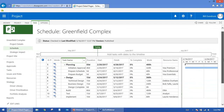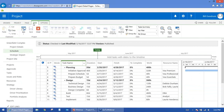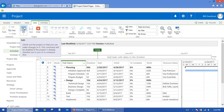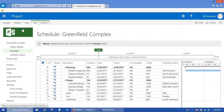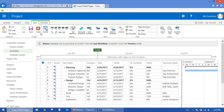A recently improved capability is that you can now do editing of your project schedules directly in Project Online. You can open the same project in Microsoft Project on the desktop, but you can also do a lot of basic editing right in the web app — updating percent completes, indenting and outdenting, linking tasks together, and assigning resources to tasks. If you're doing heavy-duty scheduling, you'll still want to use Project on the desktop, but for simple changes or small projects, the web app works well.